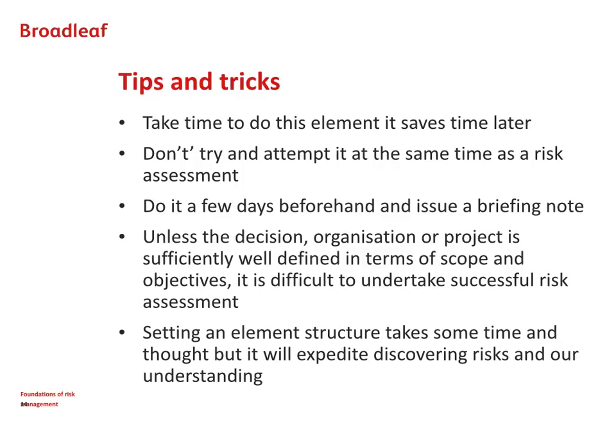Another tip is that unless the project or decision is sufficiently well defined, and particularly its objectives are well defined, it's really difficult to move forward. In fact, if the project manager or the organisation can't properly define the objectives of the decision being taken or the project being planned, then we should really stop the process at this point.